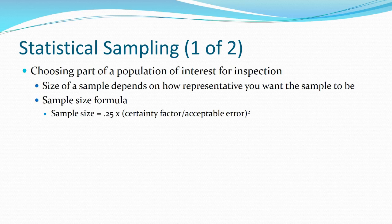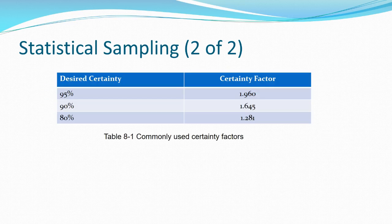Statistical sampling uses a smaller part of an overall population to hopefully give us some representation. It's often impossible to sample an entire population — if you're trying to determine users nationwide or statewide, you might want to use statistical sampling. For example, if we want a certainty of 95%, our certainty factor breaks down to a 1.9% error rate. That means we can have 95% certainty of no defects if we sample people at that level.